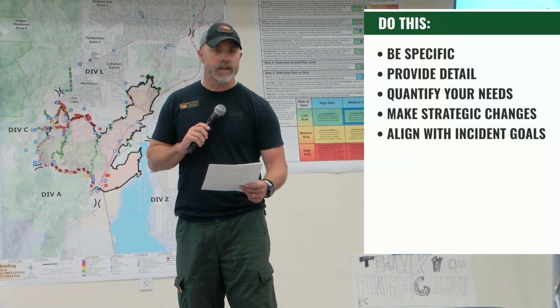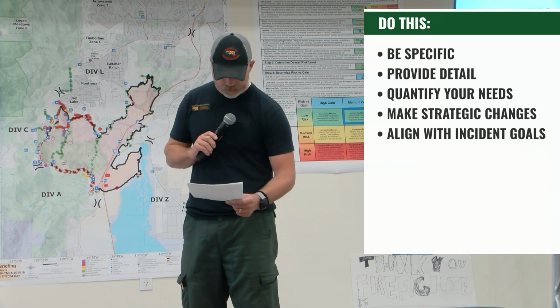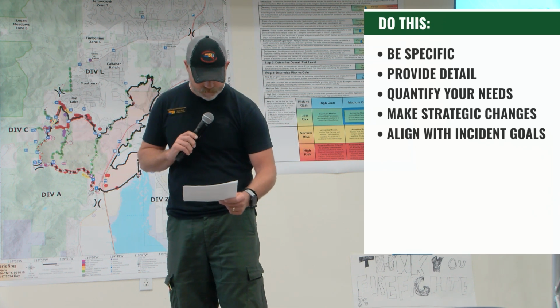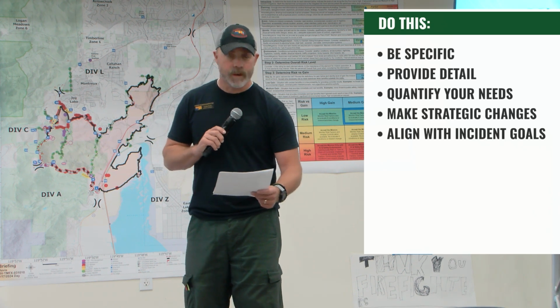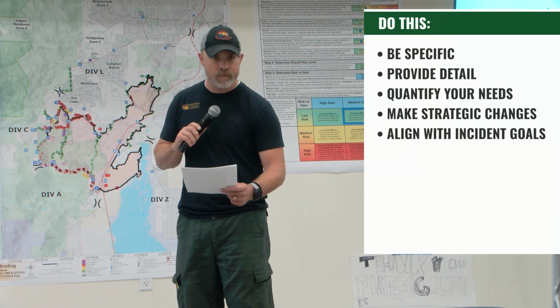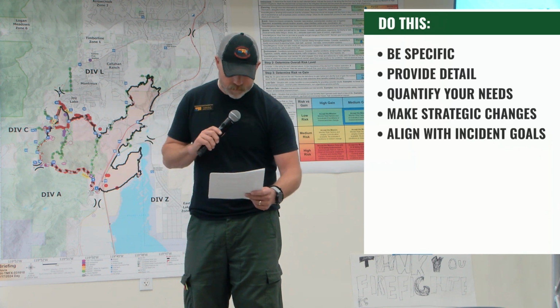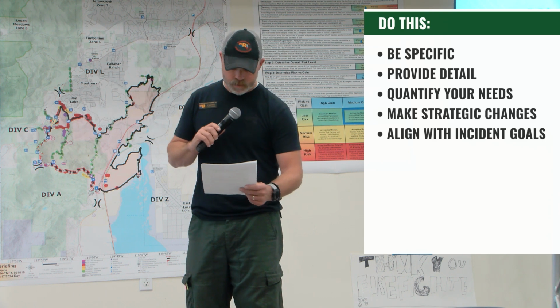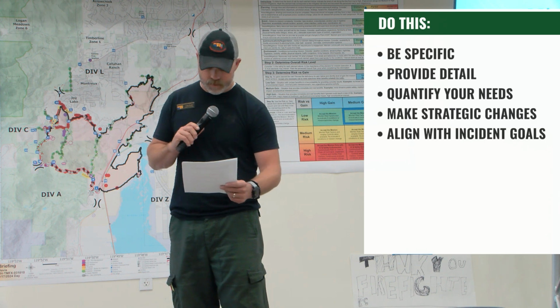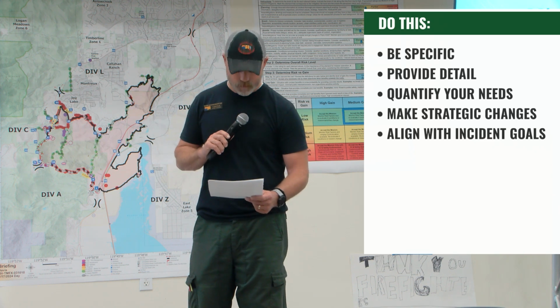Now, regarding the issues and challenges, here are the operational issues that I would be presenting to planning ops or that party that's receiving this information. Crews are facing steep terrain near the Poppy River, which has slowed progress, but no safety incidents are reported. As far as our resource shortfalls, we're short 1 water tender, impacting mop-up efficiency. We are rotating equipment to cover shortfalls, but progress is going to be slower.